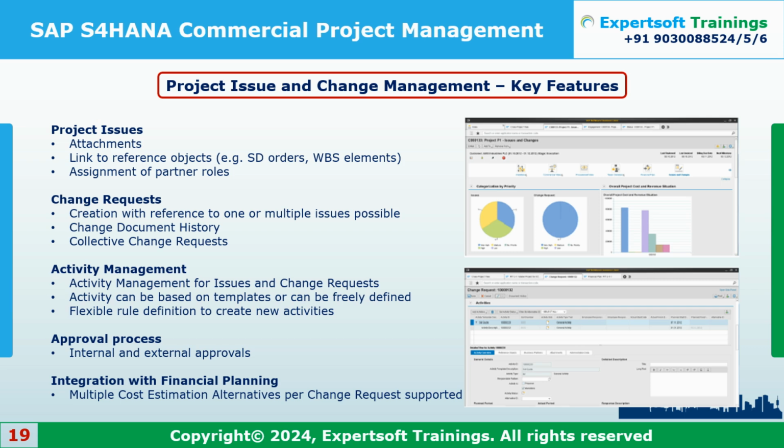Correct. Is that also feasible? We have done three different kinds of approvals like L1, L2, L3. L1 is my customer, L2 is my project manager, L3 is a delivery manager. The customer has to approve first, then the project manager approves, then my delivery manager approves. Once that is done, I'll close that issue. You close that issue.